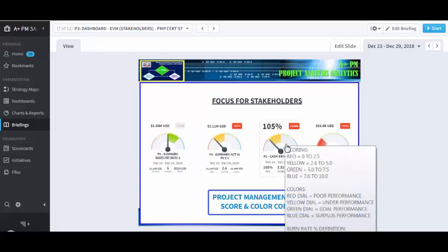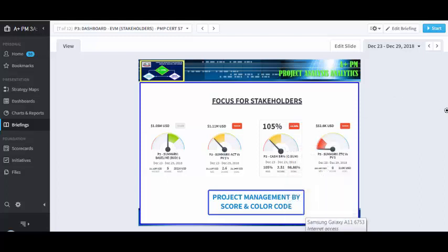We've identified that the cash burn rate is a problem in comparison to the performance of the project, right? And we've stated that the burn rate is exceeding the pace in which the work breakdown structure is performing based on budgeted dollars. So let's drill down on that.